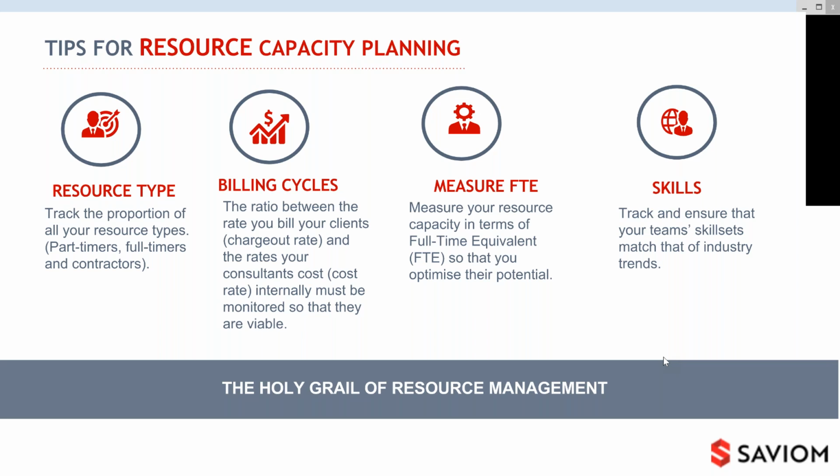The moment you do that and add up the number of FTEs you have, you have a much more accurate view of all your staff. And the better thing, which logically leads to the next part, is that once you measure FTE, you can also measure the work that you have coming up in FTE as well, and measuring and comparing the two becomes a lot easier.